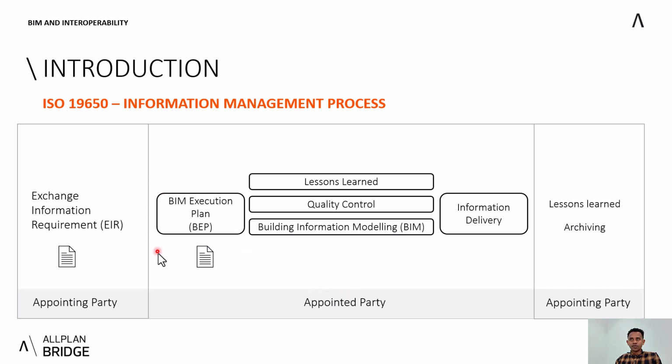So they can provide a BIM execution plan prior to being appointed. While they're candidates, they can set up a BIM execution plan, basically saying, if we win this or take the project, we will do the requirements by using this approach, this framework, or this BIM authoring or designing tool, and so on. So they specify all the plans for how they are going to achieve the requirements set by the appointing party. They set this before being appointed.